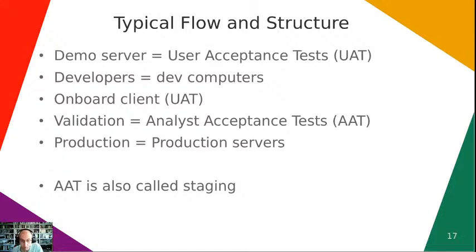You have to talk with the project manager, the BEM, and the tech ops team. We have to get together and say, okay, what are we going into? Where are we doing this? What do we need? And we make the decisions. We buy the software, or we discuss with the client if they're buying the software, and we define the steps to get that in place with the timeline that we need. It's not the same to set up a load balancer on GCP and a bunch of servers as to just boot up a DigitalOcean server and install Ubuntu. The timelines are totally different.